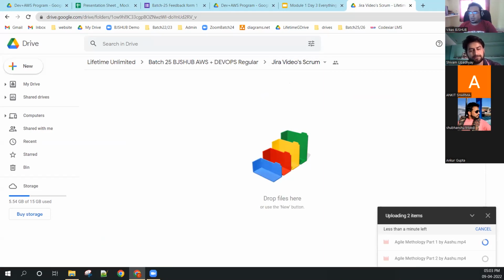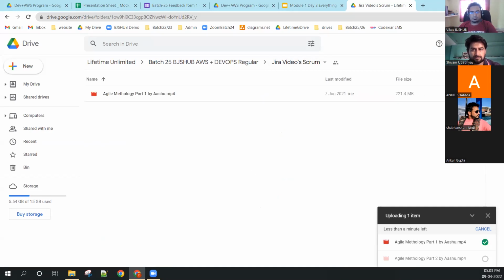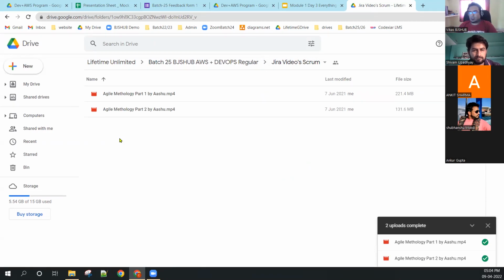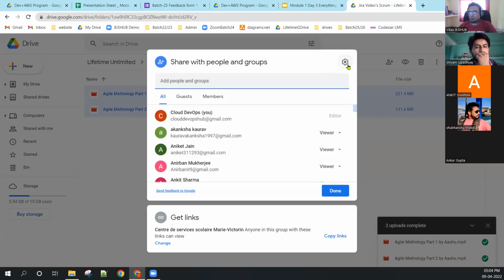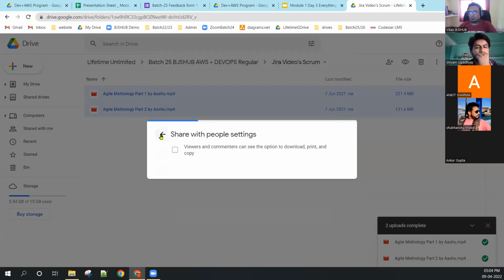Based on the refinement, we story point the ticket, like 2 or 1. These points specify the amount of effort and time that development might take to make it work.